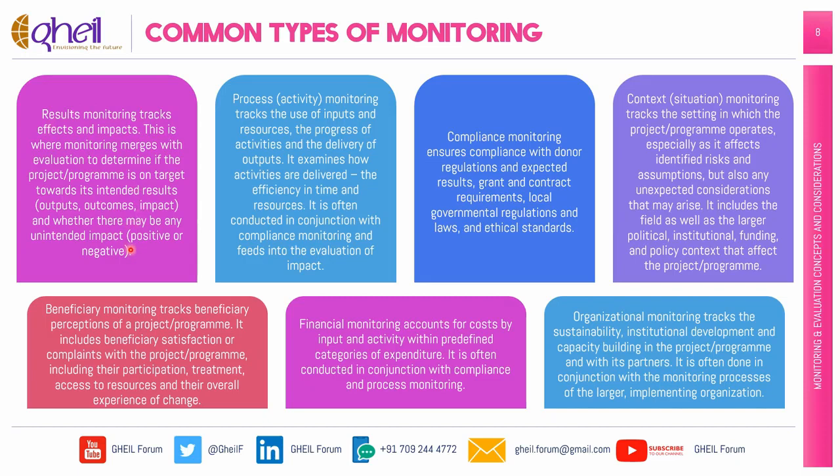Results monitoring tracks effects and impacts. This is where monitoring merges with evaluation to determine if the project program is on target towards its intended results, outputs, outcomes, impact, and whether there may be any unintended impact, positive or negative. For example, a psychosocial project may monitor that its community activities achieve the outputs that contribute to community resilience and ability to recover from a disaster.